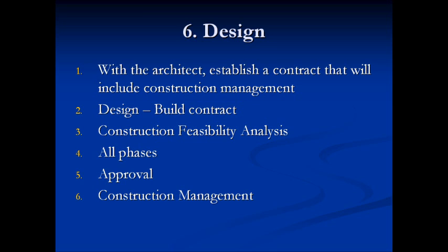Next, we would have all the various phases of the architecture project, including schematic design, design development, and construction documents. And after the project has been approved by the authorities, which I'll go into a little more detail in our last slide, but after it's been approved, then comes construction management. And basically, that's the architect serving as a policeman to make sure that the general contractor is doing his job as much as is possible.